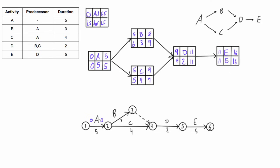Now activity B, we bring this five over so activity B starts on five, we add three and it ends on eight. Activity C starts on five, we add four, ends on nine. And then when we come in to decide what the early start of activity D is, we have to consider the two competing options because there's two arrows coming into this point in time. So one of the options could be nine which was the early finish of activity C, and the other option eight. What you can do is you can just bring this here and if you want, because this arrow has zero duration, sometimes I would write an eight there and then an eight there.